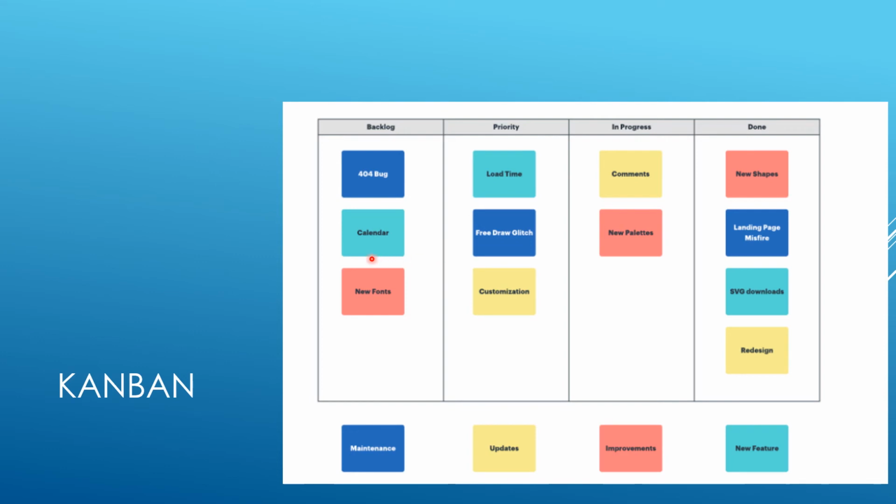It's a simple visual mechanism to identify how your work item or user story travels across different states, and to smoothen and optimize the whole flow. That's the idea behind it. For metrics, you can use lead time and cycle time. Try to optimize your lead time and cycle time, and improve your flow efficiency. That's the idea behind Kanban, and it has a continuous feedback loop as well.